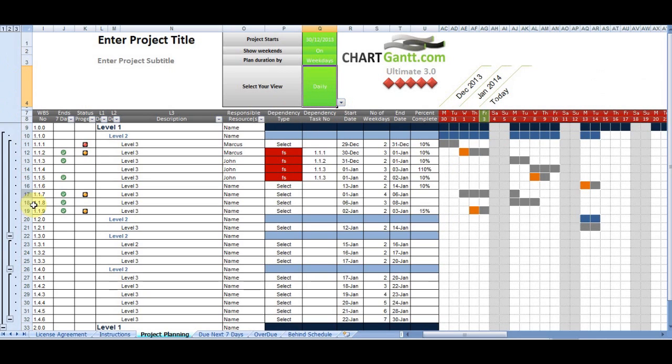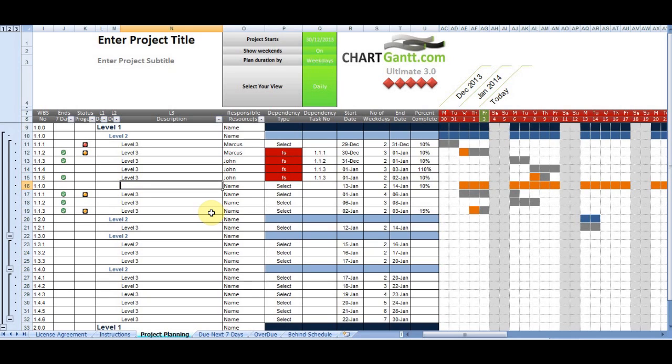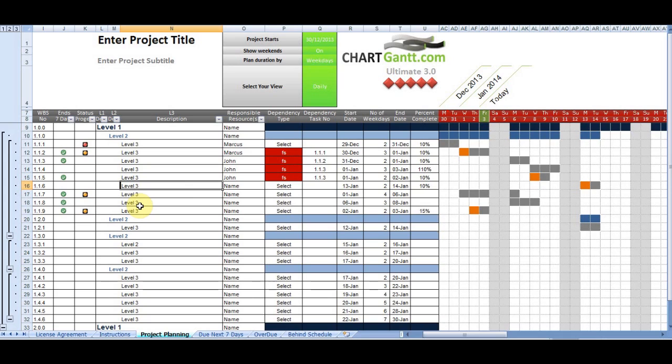So just explaining the screen layout in each column. The first column is a typically structured WBS breakdown, so 1.1.5, for example. Now, we're able to change that instantly and change our levels. So this is a structured three-level work breakdown structure. We can change a particular task instantly by just changing the level at which we're operating.